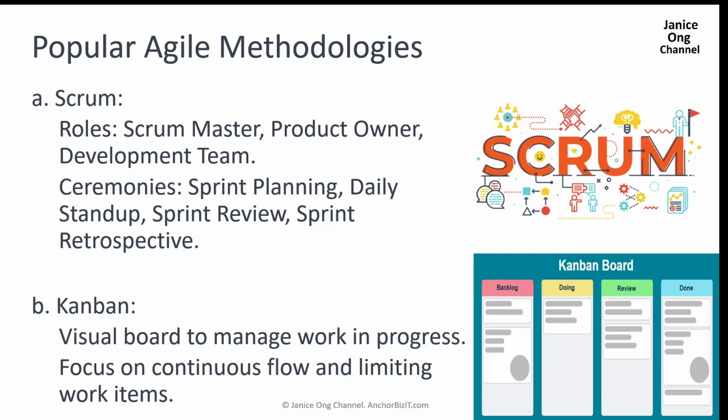Ceremonies. Sprint planning. At the beginning of each sprint, the team holds a sprint planning meeting. During this meeting, they decide on the work they will complete during the sprint and create a sprint goal. Daily stand-up. The daily stand-up is a short daily meeting where team members provide updates on their progress, discuss any obstacles, and plan their work for the day.